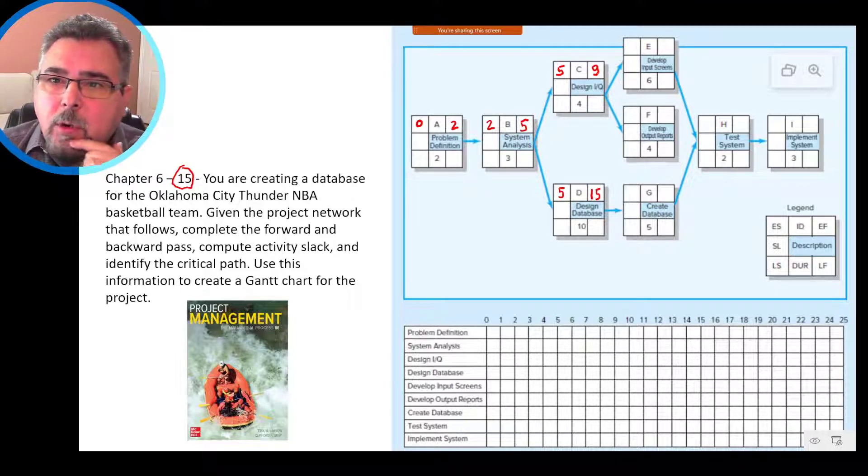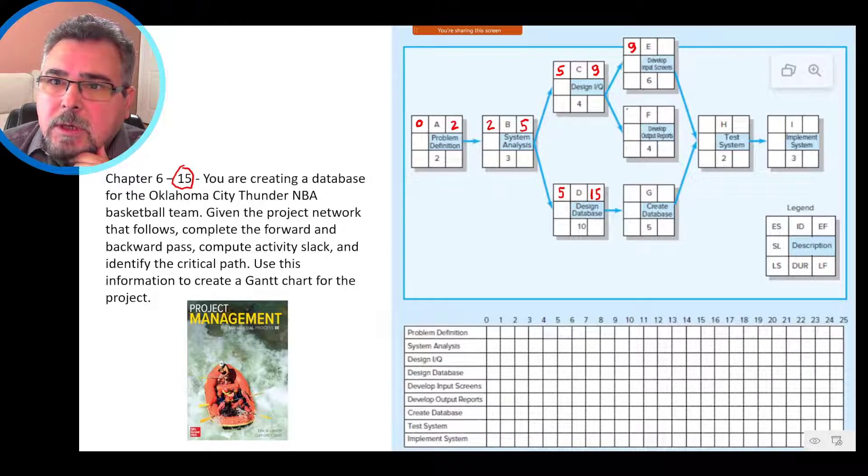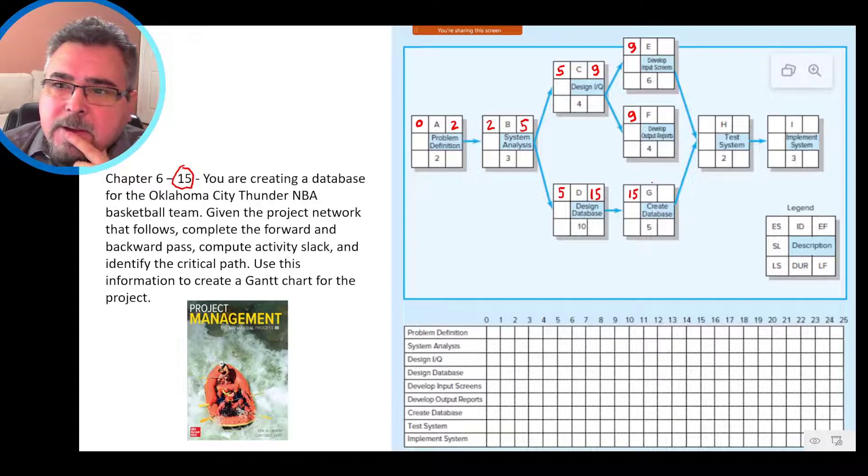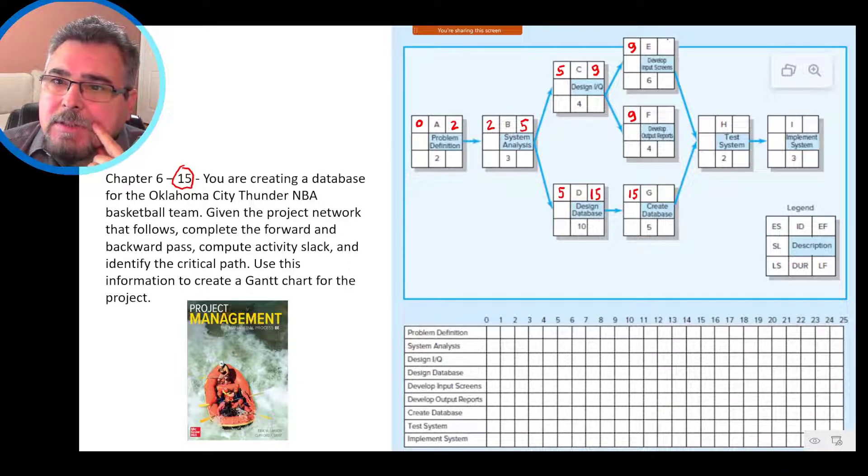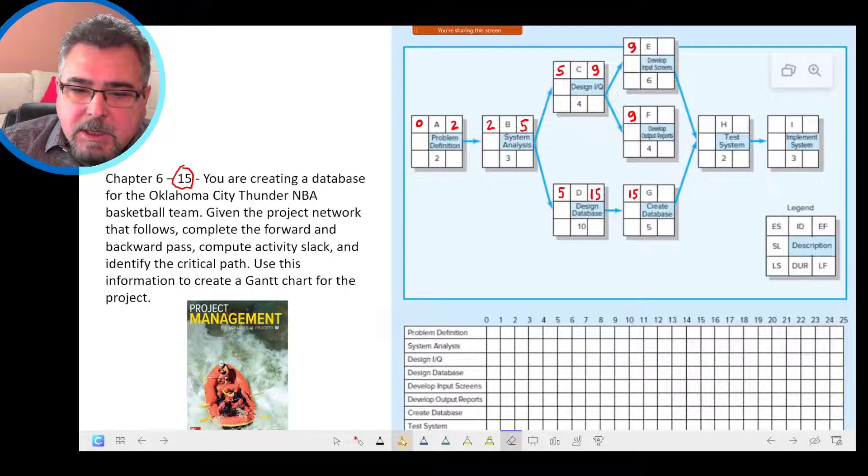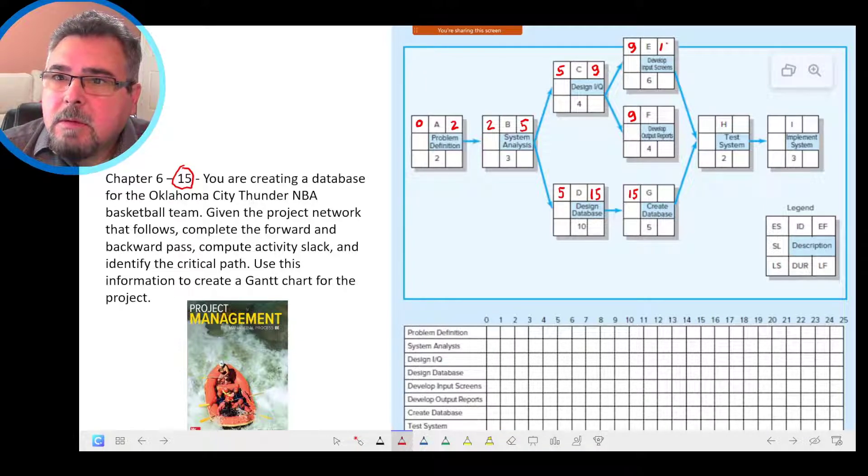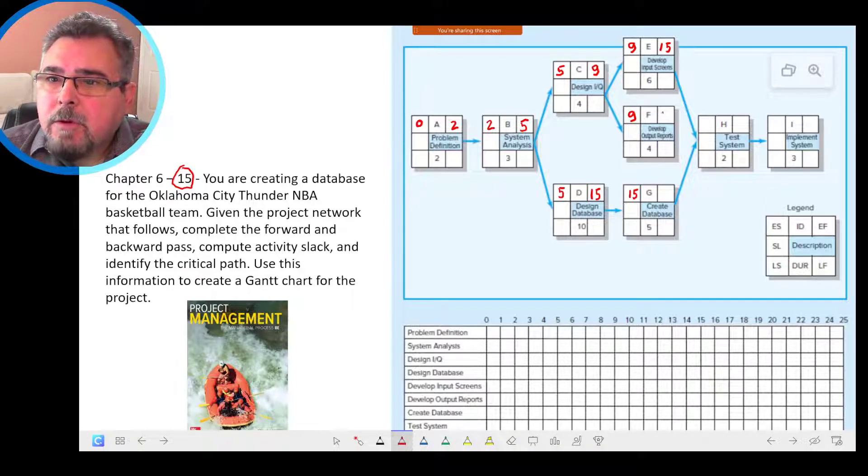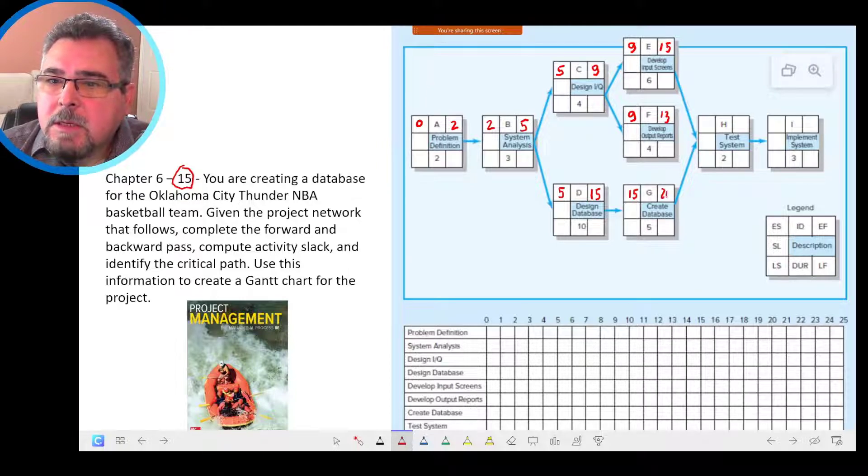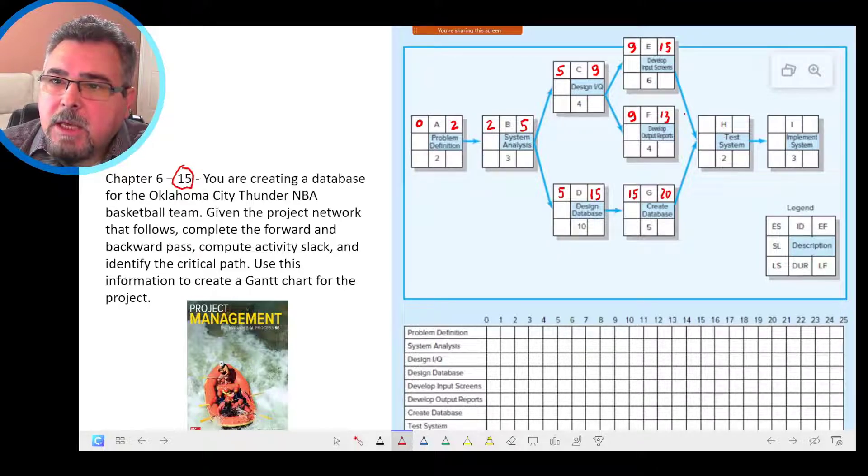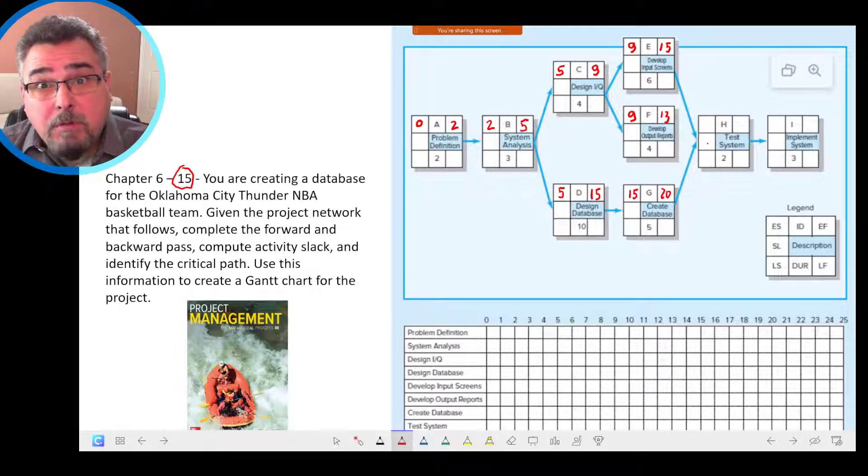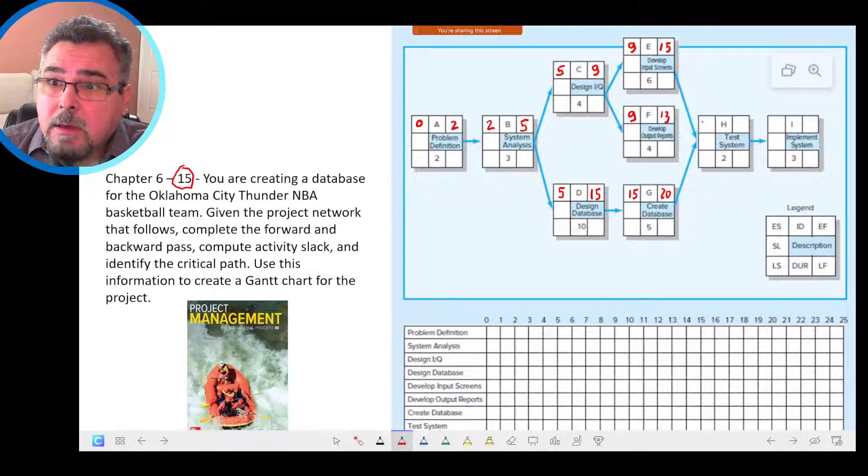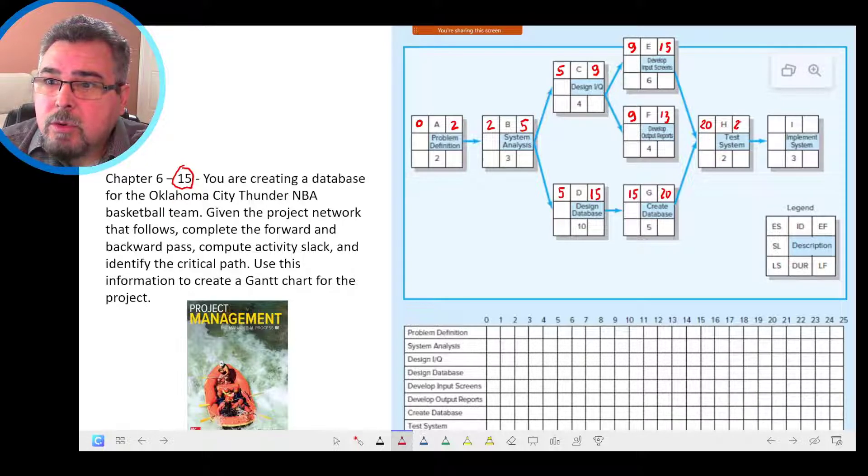Then we move forward the nine, so nine goes here, and here, 15 comes here. So then we have the activity nine going, we have nine plus six, 15, nine plus four, 13, 15 plus five, 20. So now we have a merge activity, activity H, we have 15 from E, 20 from H. So because it's the forward path, we take the highest number, 20, 20 plus two, 22.